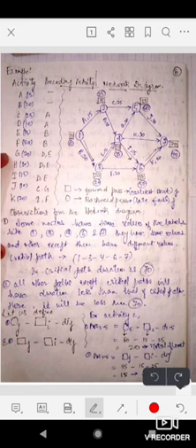But C and D follow activity A. They will be started only after completion of activity A, because in the table it is given that C and D can only be started after completing activity A. So we can see here, at node 2 activity A is completing, this arrow is showing activity A. Then from node 2 we will start activities C and D. Therefore we will start C and D after A.